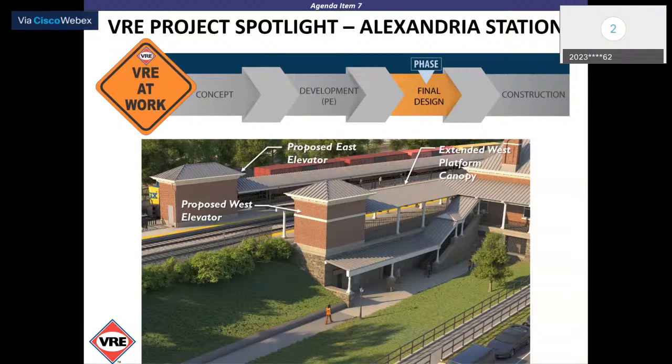We look to complete that hopefully by about March of 2021, with the procurement for construction to soon follow. It's likely to take a couple of months, with the projected start of construction in August of 2021. And if we hit that date, then the construction duration would take us out for a project completion of about March of 2023.